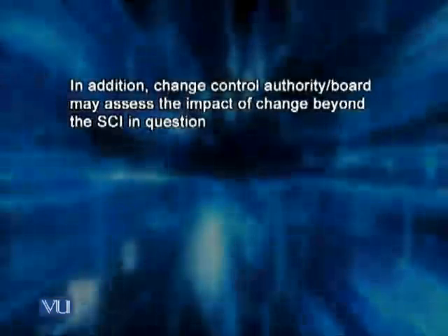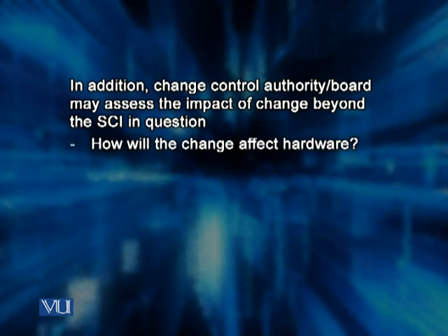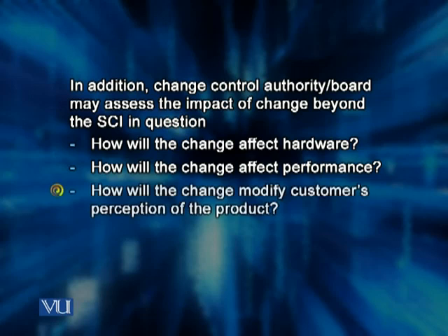In addition to these important factors, the Change Control Board may also assess the impact of changes beyond the SCI in question. So a board may ask questions like, how will the change affect hardware? Or how will the change affect performance of the software product? Another relevant question to be raised and answered satisfactorily at that time could be, how will the change modify customers' perception about the product?